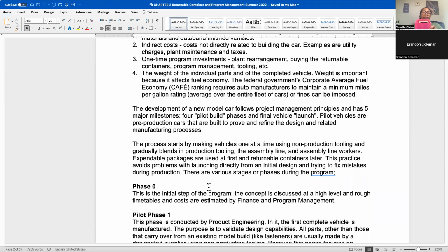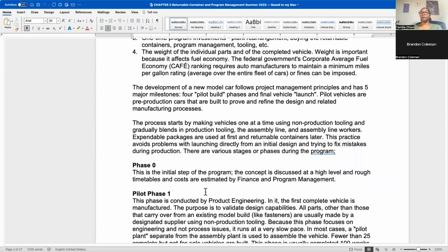Because I've been in plants where we have production, the pilot builds, and they will have room for a small tote instead of a full pack. And maybe they're big parts, and you know that there's not enough room allotted for those parts. So that's why I say you want to get involved early on as soon as you can, because if you don't, you may end up with some packaging that you don't like, and it would be really difficult to work with at that point.